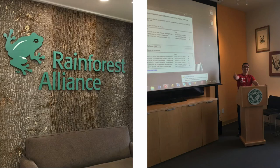Then I held up the card, which could have just been something huge like the homepage. And I asked, what do you guys think this is? So they all guessed, in hours or days or whatever. And then I would say what he guessed. At first it was wildly off. And then they started to pick up what his strategy was. So if it were a profile page, they were like, oh yeah, so profile pages are an 8.